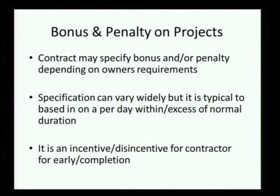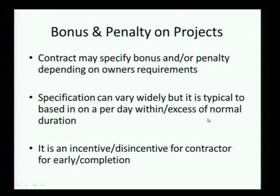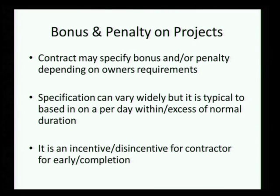Let us move on to the next variation of this problem, which is bonus and penalty. We want to now include bonus and penalty, and all of you are aware that in many contracts there are bonus and penalty clauses. Typically it is on a daily or weekly basis: if you finish so many days ahead, you get a bonus; if you finish so many days late, it is a penalty. The reason for this is the owner, if he gets a facility early, can generate revenue from it, and passes on some of that to the contractor. On the other side, if he cannot use the facility, he loses money and penalizes the contractor. This is certainly an incentive for the contractor to try to finish earlier.